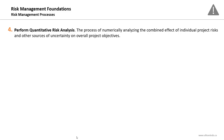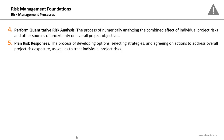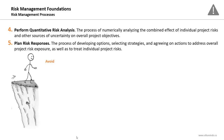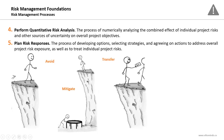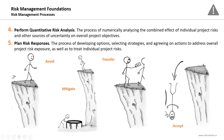Quantitative Risk Analysis is the numerical analysis of the combined effect of individual project risks and other sources of uncertainty on the overall project objectives. Plan Risk Responses is the process of developing options, selecting strategies, and agreeing on actions to address overall project risk exposure as well as individual project risks. For example, if there is a risk of jumping from an edge, you could go the other side — that's avoidance — or ask for support to reduce the impact of falling — that's mitigation. You can pay someone to jump instead of you — that's transfer — or you can just accept and jump.